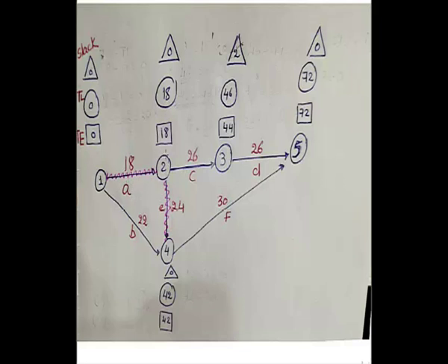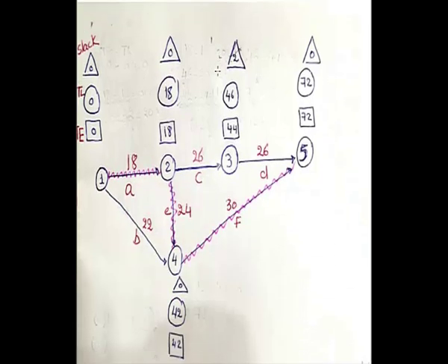Okay, so if you continue from 1, that is activity 8, one activity on the critical path. Then we decided not to continue to 3 because the slack here is not equal to 0, but at 4 it is equal to 0. Then we have to continue at 5 because the slack here equals 0 also. This is one way to get to know the critical path by eye, and you can also know the critical path through calculations, and we'll see this in the upcoming answers.